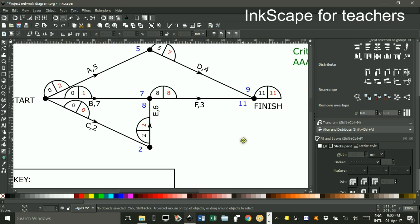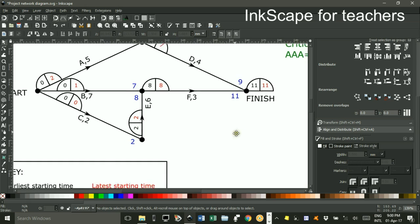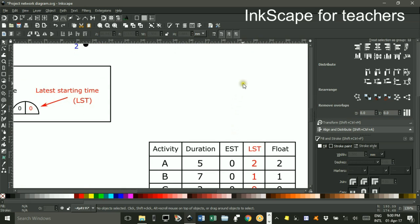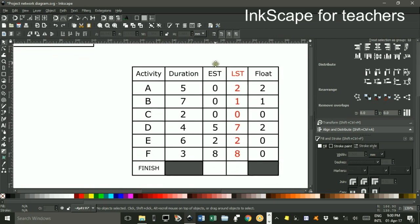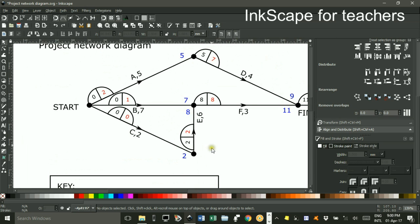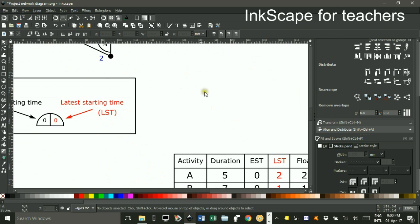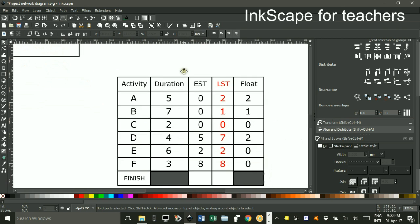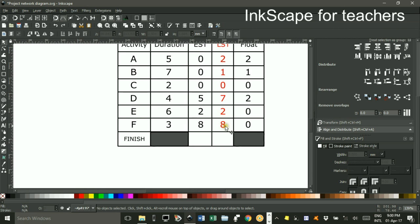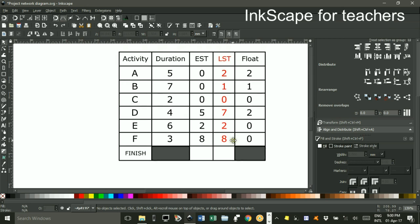Before I started the video, I transcribed these numbers from the left and right into each box. For example, D was 5 and 7. You can see D was 5 and 7 there. The total time of the project was 11. You can work that out from the table, because we could start F with 8, but it's going to take 3 hours to finish, so that makes 11 as the total.